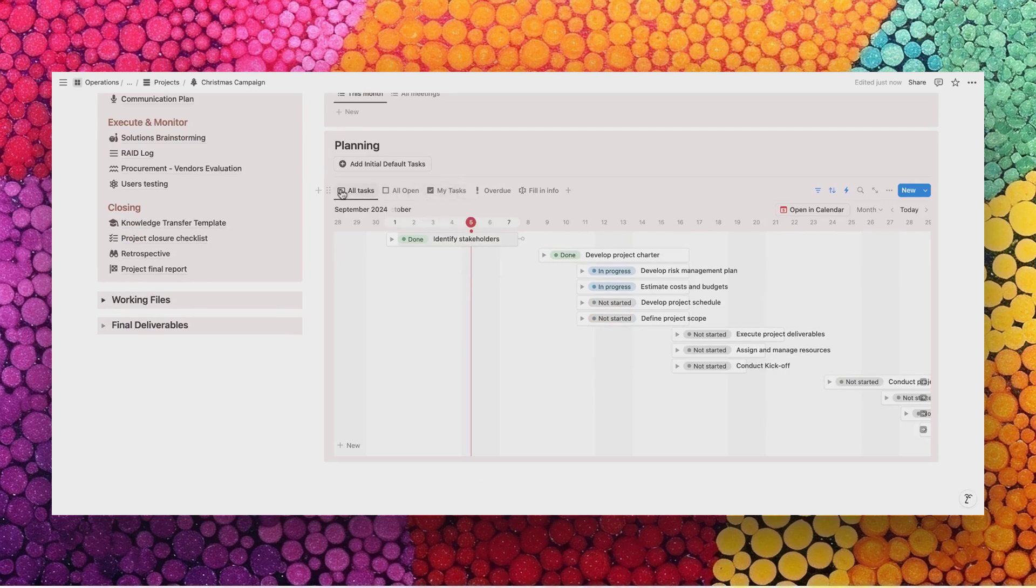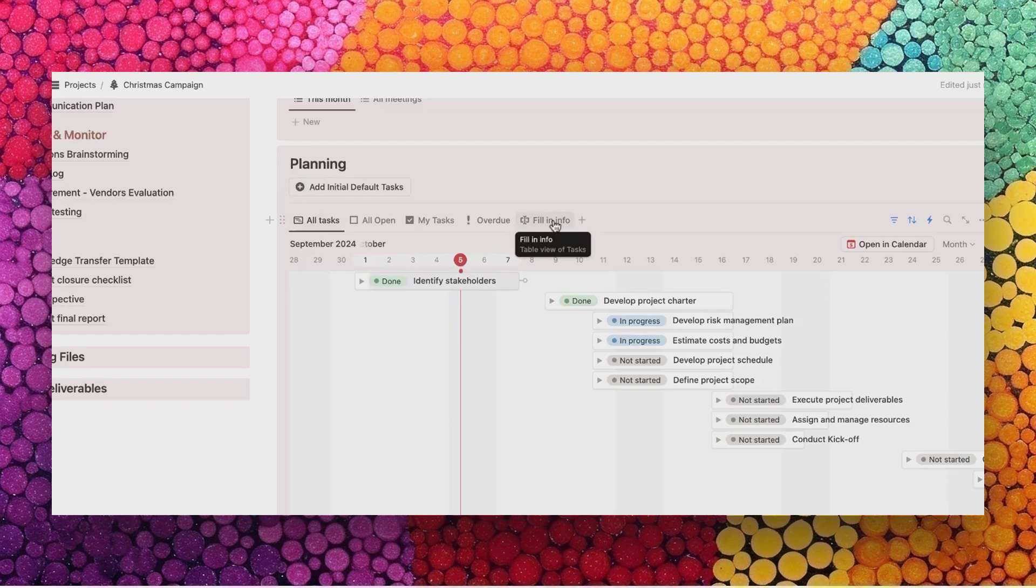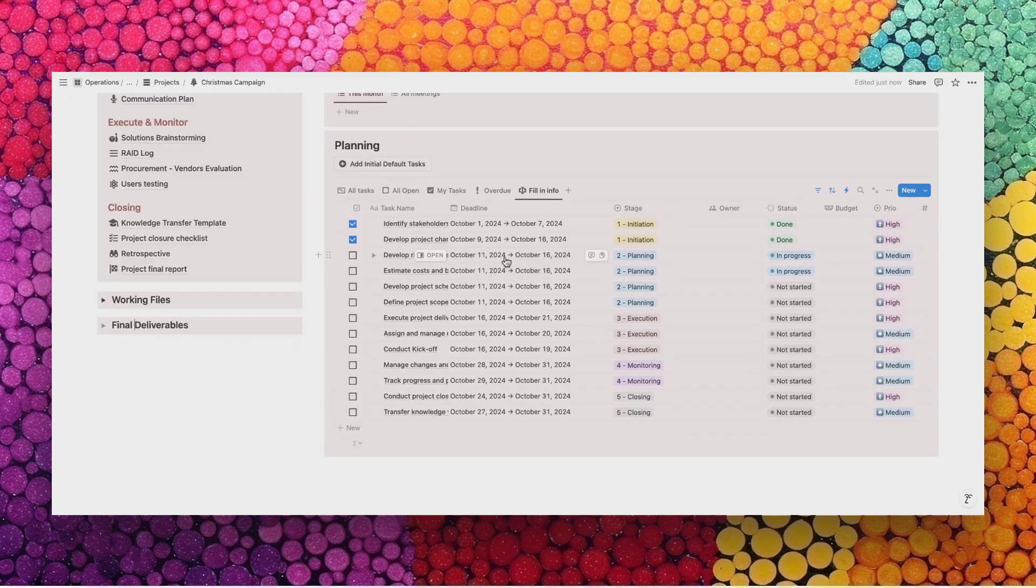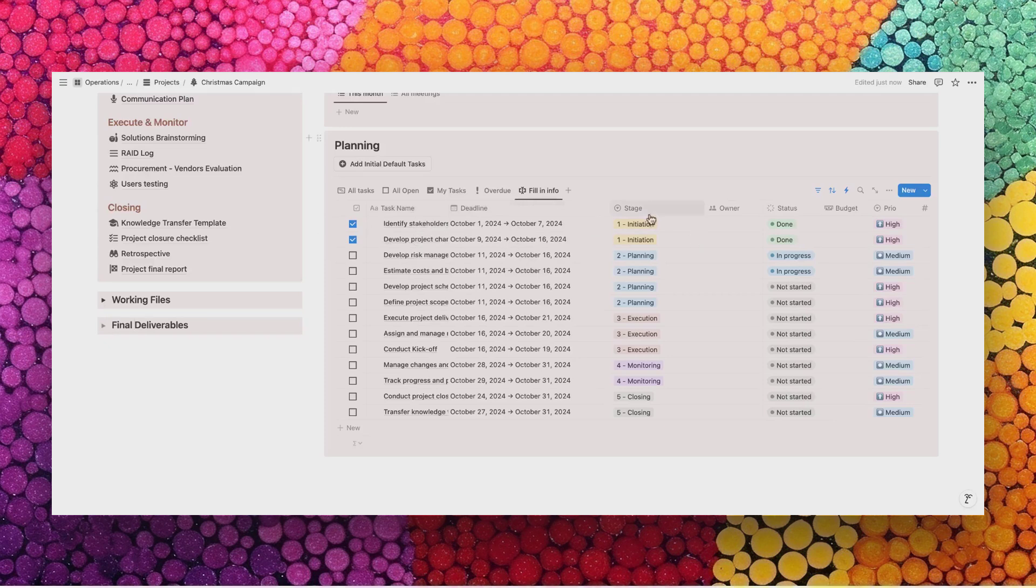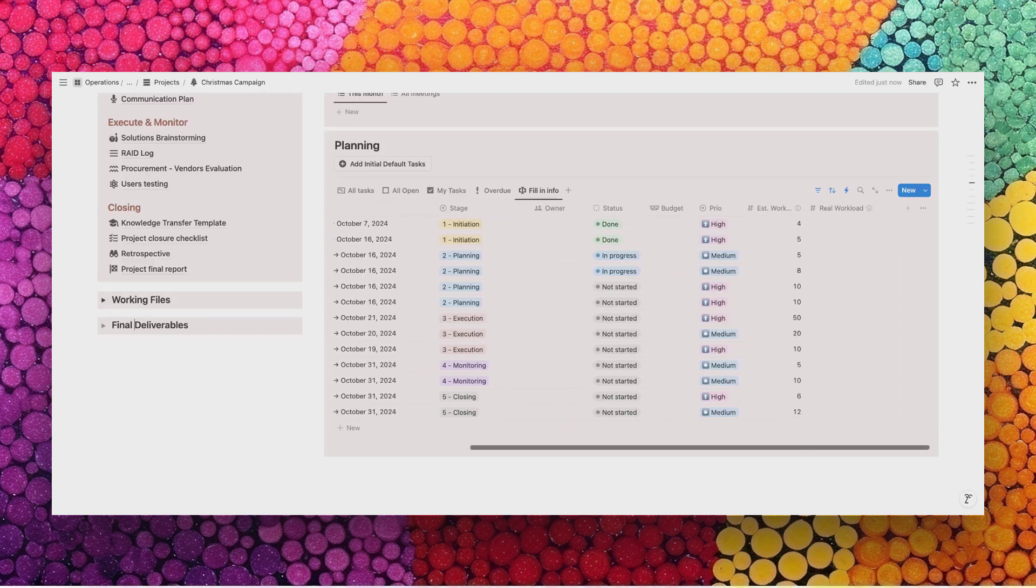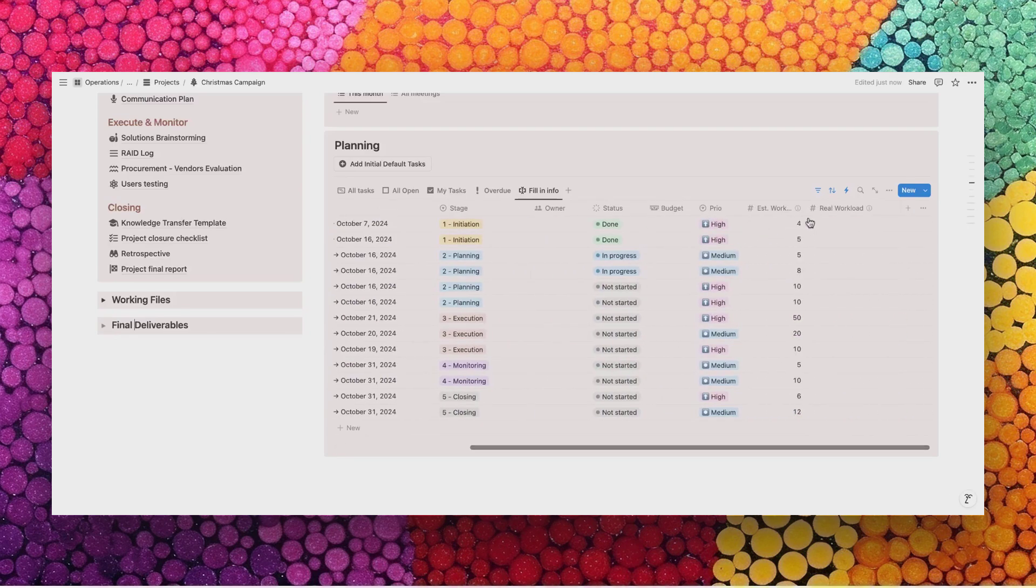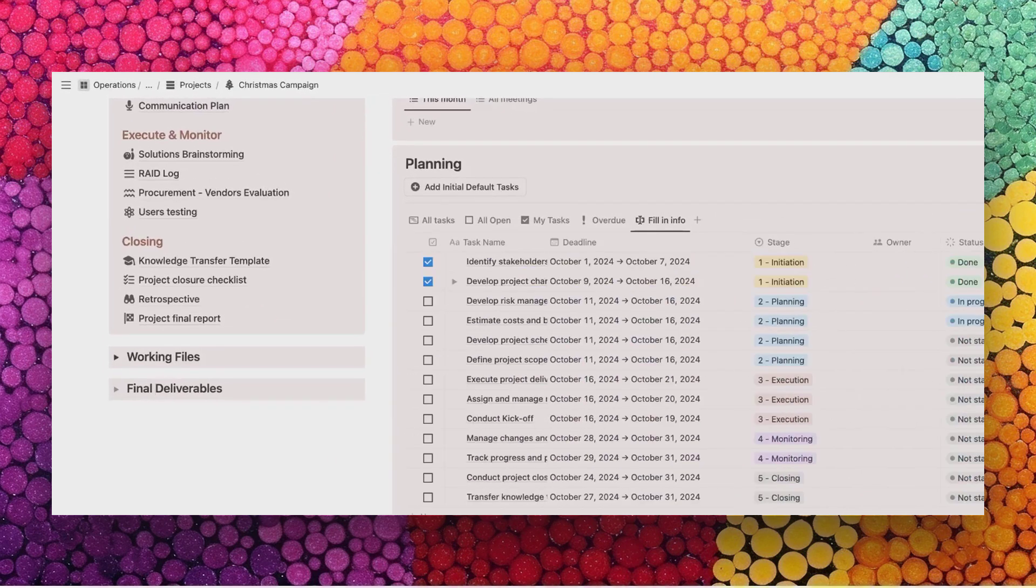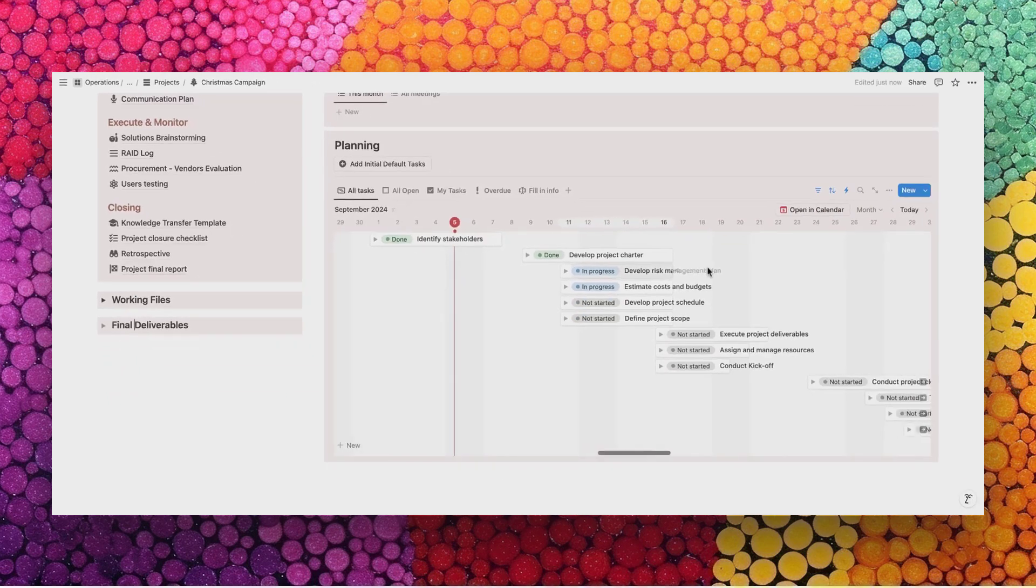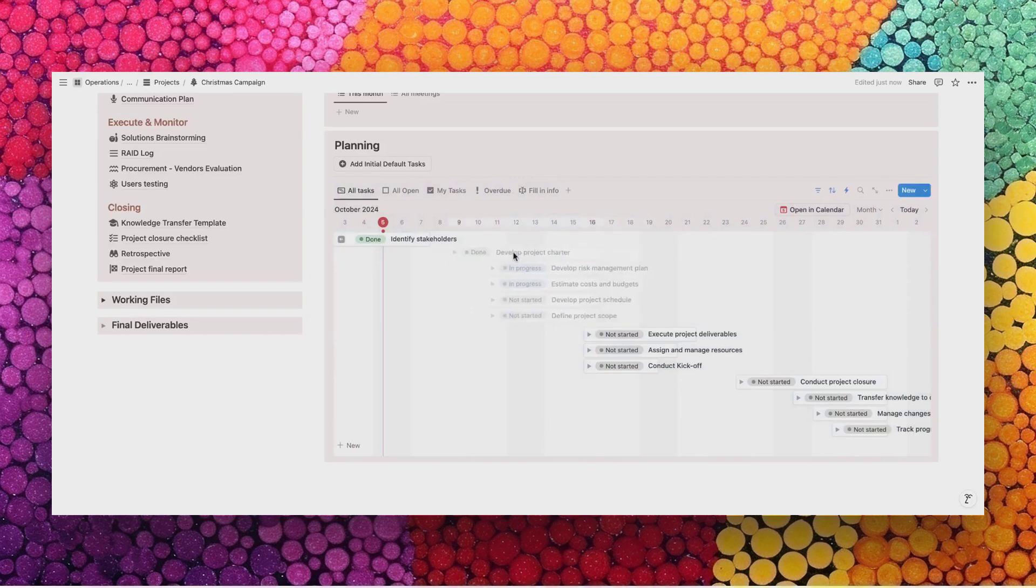Here, there is also a view called fill in info. I recommend you to always start with this view. You'll be able to easily fill in all the information about your tasks with the name, the deadline, which stage it's linked to, who is the owner, the status of completion, any budget allocated to it, the priority of the task and the workload associated to completing it. All this information is used to inform your timeline. You can manipulate the timeline in the same way you've seen for the large projects by selecting several tasks starting from a point on outside to the right of the table, moving things around en masse or one by one by selecting and dragging the edges of different tasks.